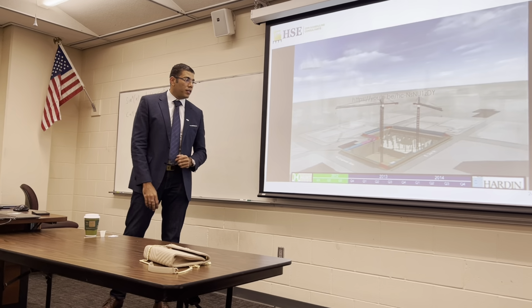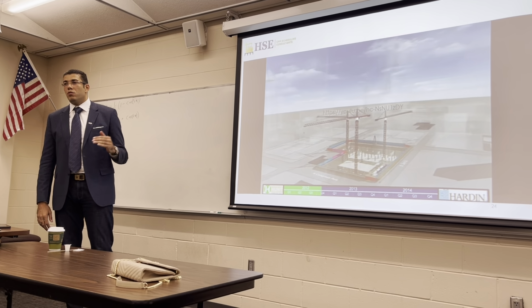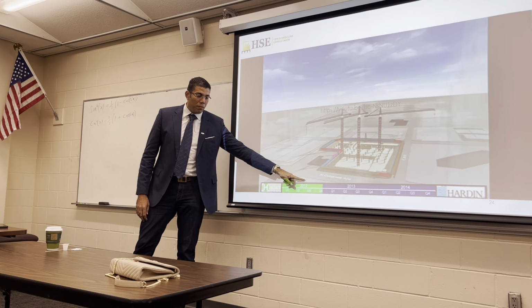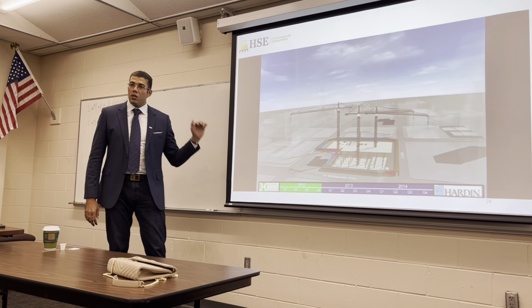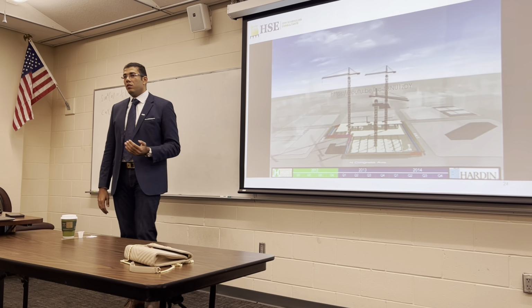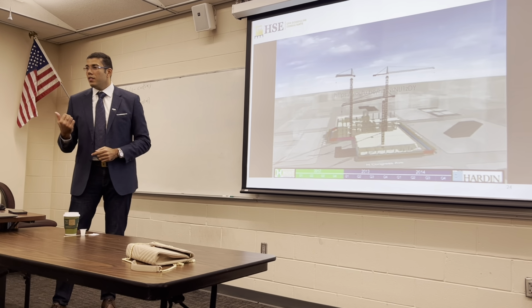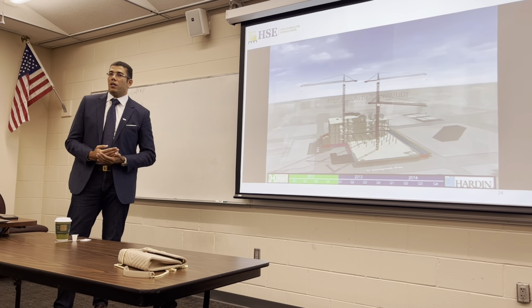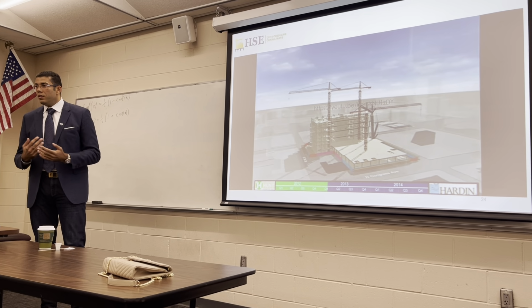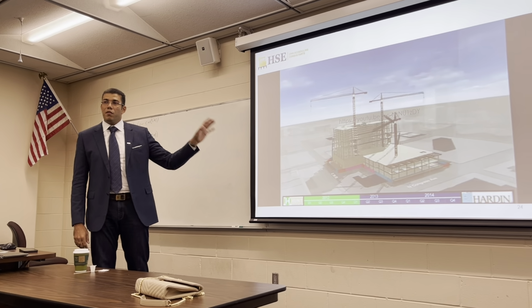We may see the first few seconds again, but the whole idea here is that every project has certain milestones that we have to hit, and as the video goes up, you're gonna see some major milestones. On November 21st, we get to milestone A, and then maybe 3 months later we get to milestone B. So basically, what owners do is that they tie that schedule to their contract. They say, we expect you to finish foundations by the end of the first quarter. We expect you to finish the structure maybe 6 months later, right? So that becomes a contractual obligation, and that's why a lot of people get involved with them.